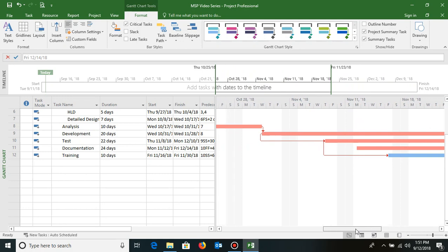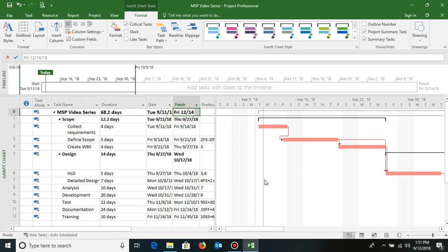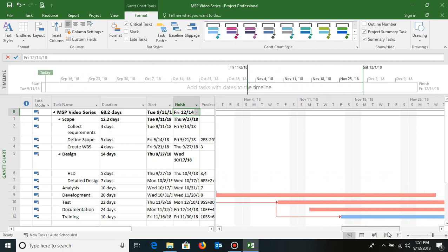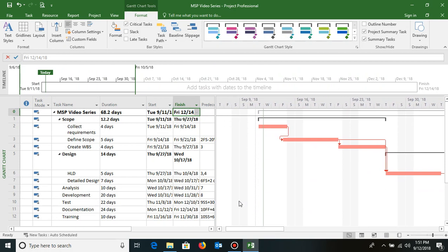So having all the activities on the critical path means that my project is highly risky. That means all the activities are very critical. Having multiple critical paths also is dangerous in a project. So now this is the first draft of the schedule. Now we need to identify whether there are ways we can save time and optimize the schedule properly. Here most of the things are in finish to start mode, with few in finish to finish or start to start. That's why we have almost all the activities in critical. So the red ones denote the critical path of your project.